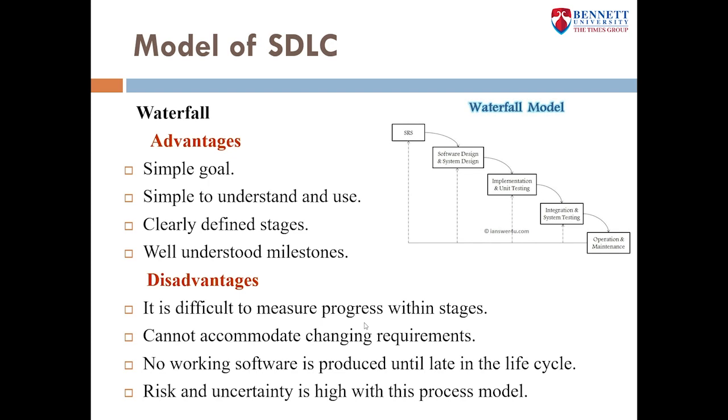So, moving on with the advantages, this model is simple to implement and the number of resources required for it is minimal. The requirements are simple and explicitly declared. They remain unchanged during the entire project development. The start and the endpoint for each phase is fixed, which makes it easy to measure progress. The release date for the complete product as well as its final cost can be determined before the development. It gives easy control and clarity for the customer due to a strict reporting system.